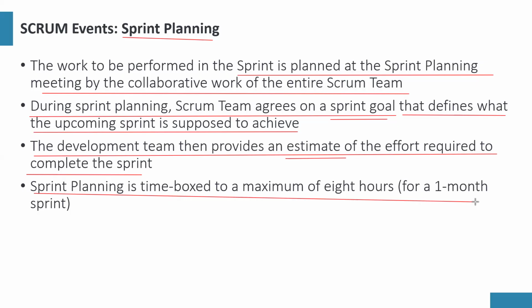If it's going to be 2 weeks, because working hours is actually supposed to be 8 hours a day. So if we use 8 hours for 4 weeks, we should use 4 hours for 2 weeks. Yes, that's it. It's a proportion. So if we are doing a 2 weeks sprint, we should use 4 hours.